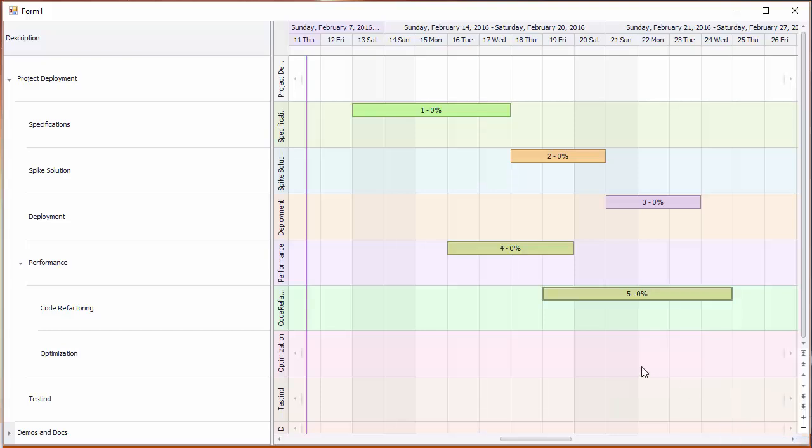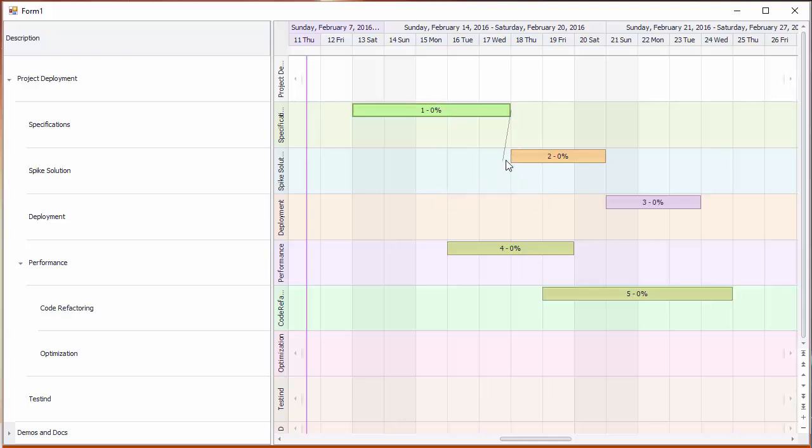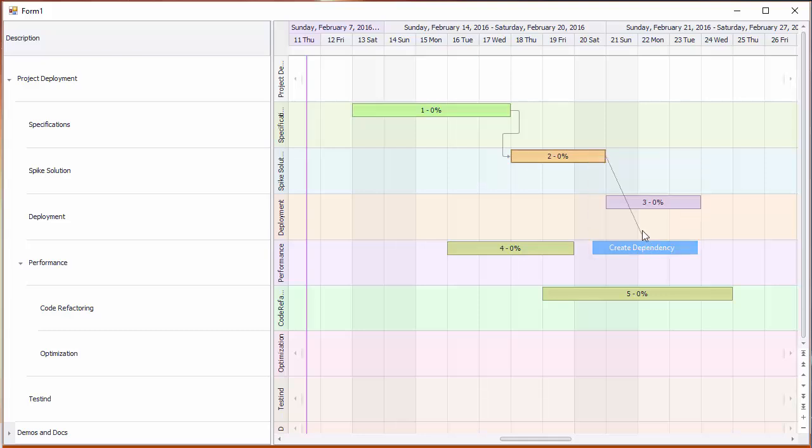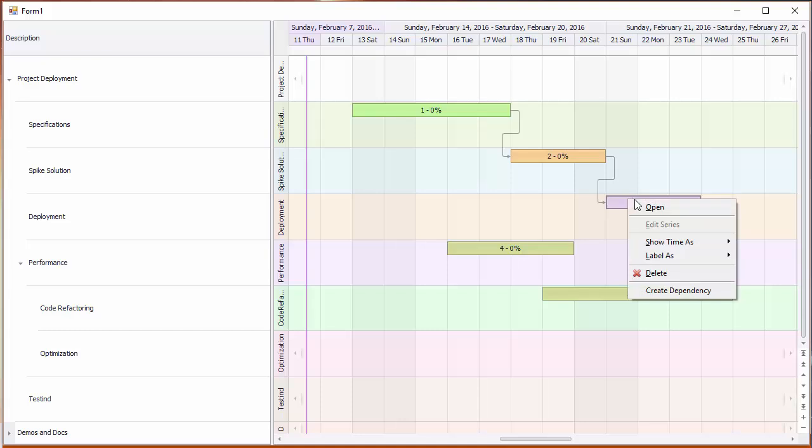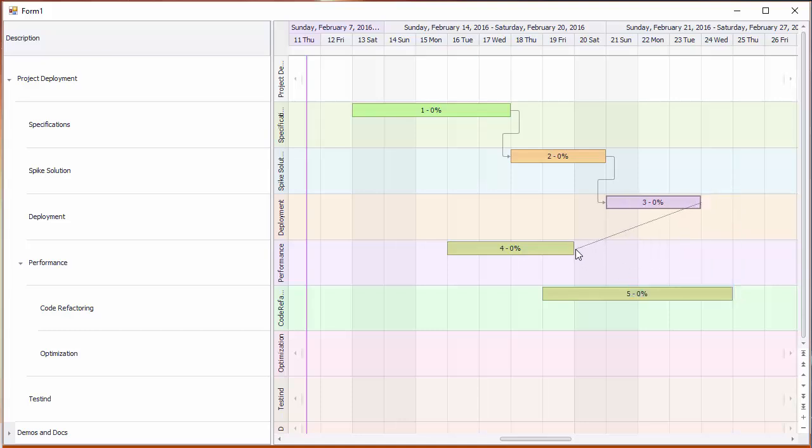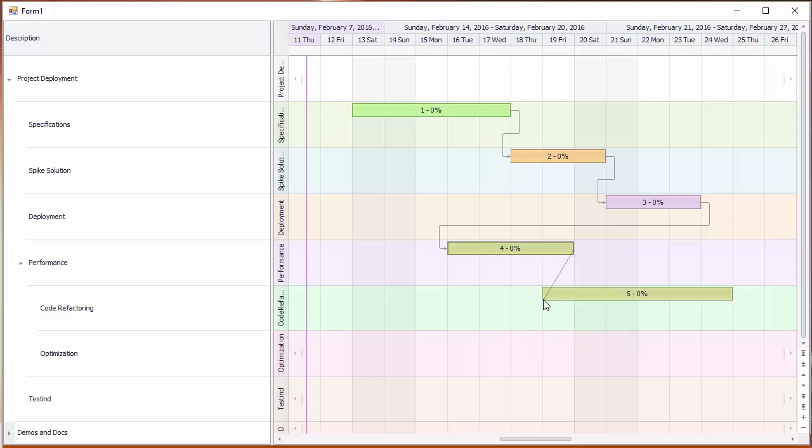Dependency arrows are constructed from the arrow tail. Right click and select Create Dependency. Then, choose which task you want to connect with the dependency. By default, the natural FinishToStart dependency is created, but you can set any combination of finish and start relations.